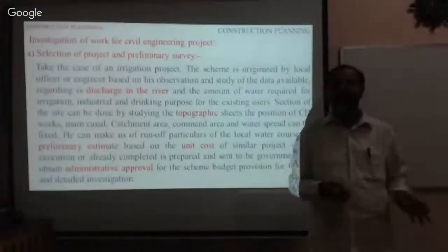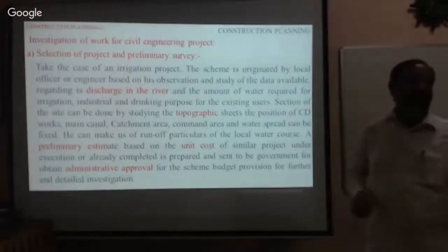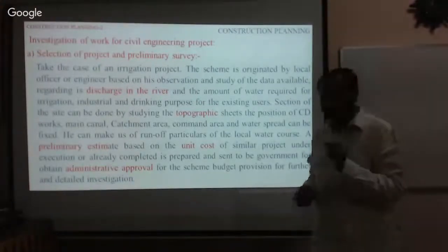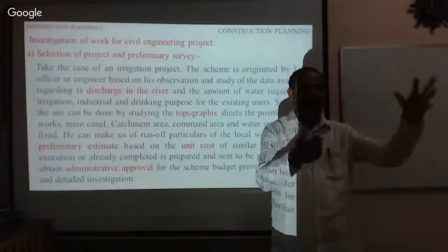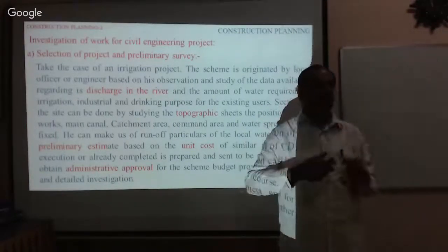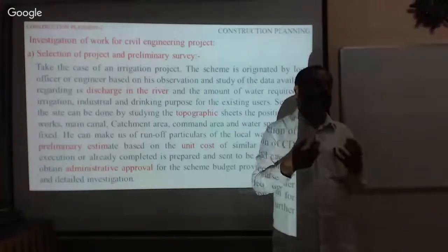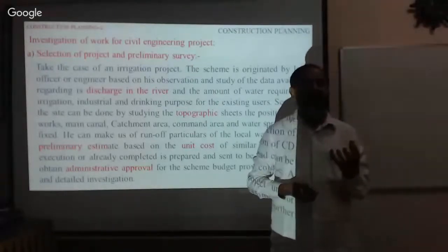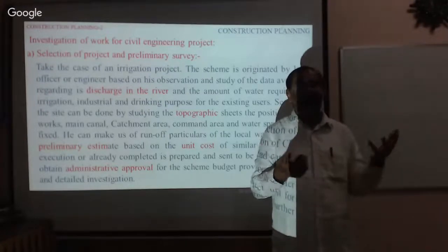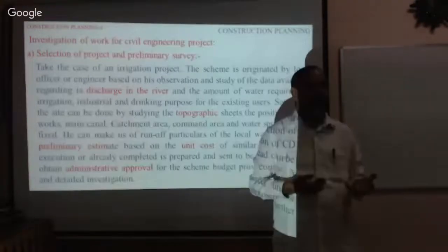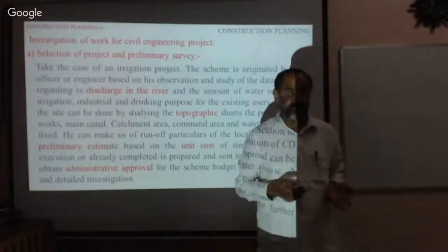The preliminary estimation has to be prepared. See the topography. If you are constructing a dam project, let us assess the amount of money involved and the amount of water we will get at the end. If we invest 100 crores and get only a small quantity of water, it is not worth building. Look elsewhere, at different locations, where we can get the output. Output should be bigger than our investment. Let us be very careful in doing this.